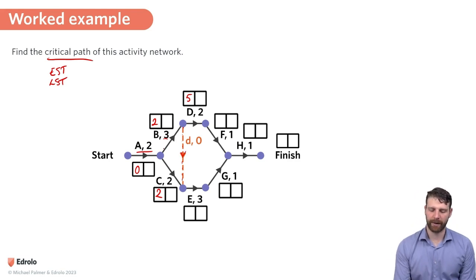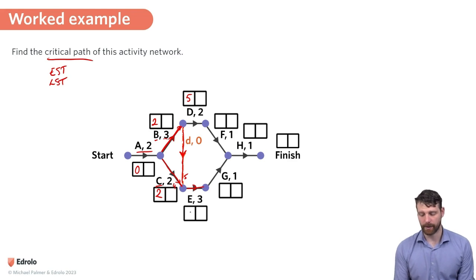And so what that means is that B has to finish before E can finish. So E has 2 immediate predecessors. It has C and B. Okay, so looking at that, I can finish C in the 4th minute, and I can finish B in the 5th minute. So E's earliest start time is actually 5 minutes, not 4. Let's keep pushing forward. I think we can find F. So D takes 2 minutes. That lets me start F at the 7th minute.